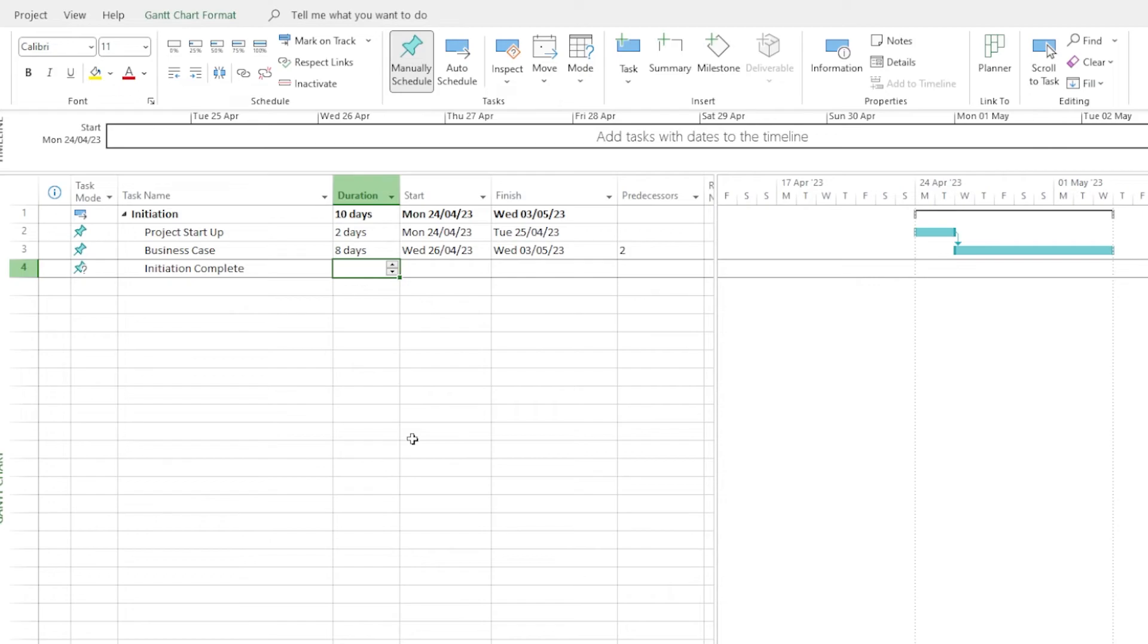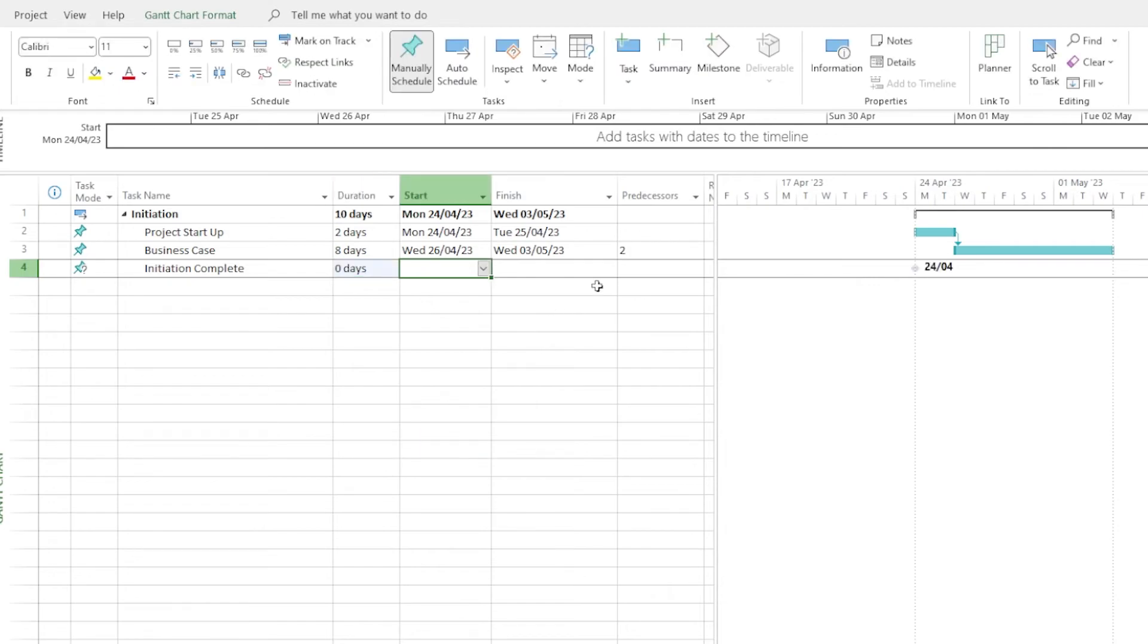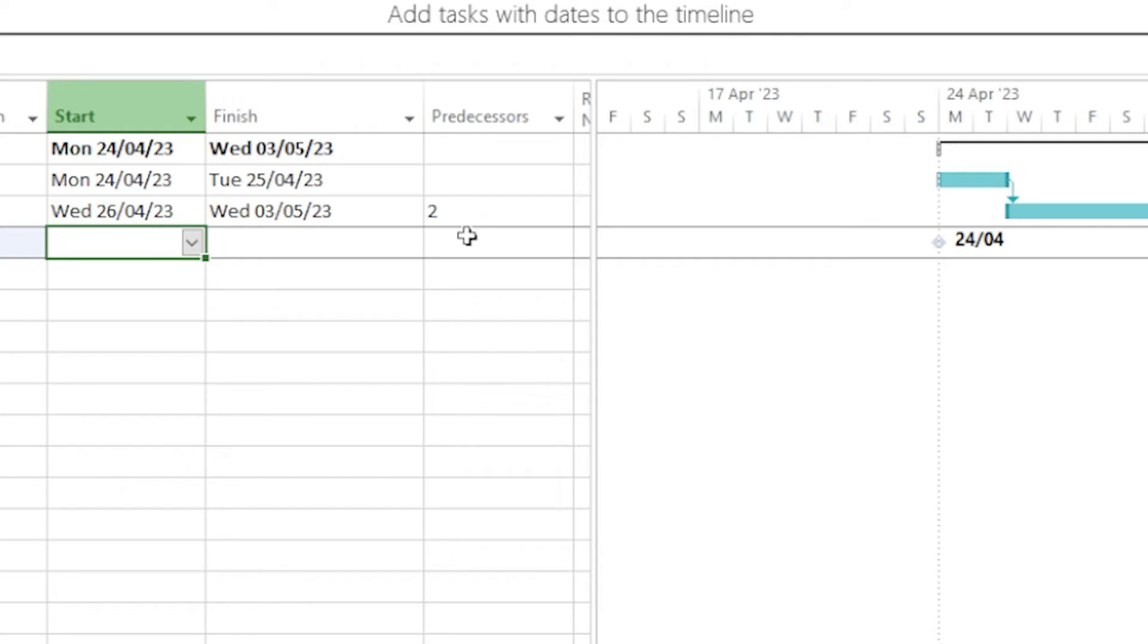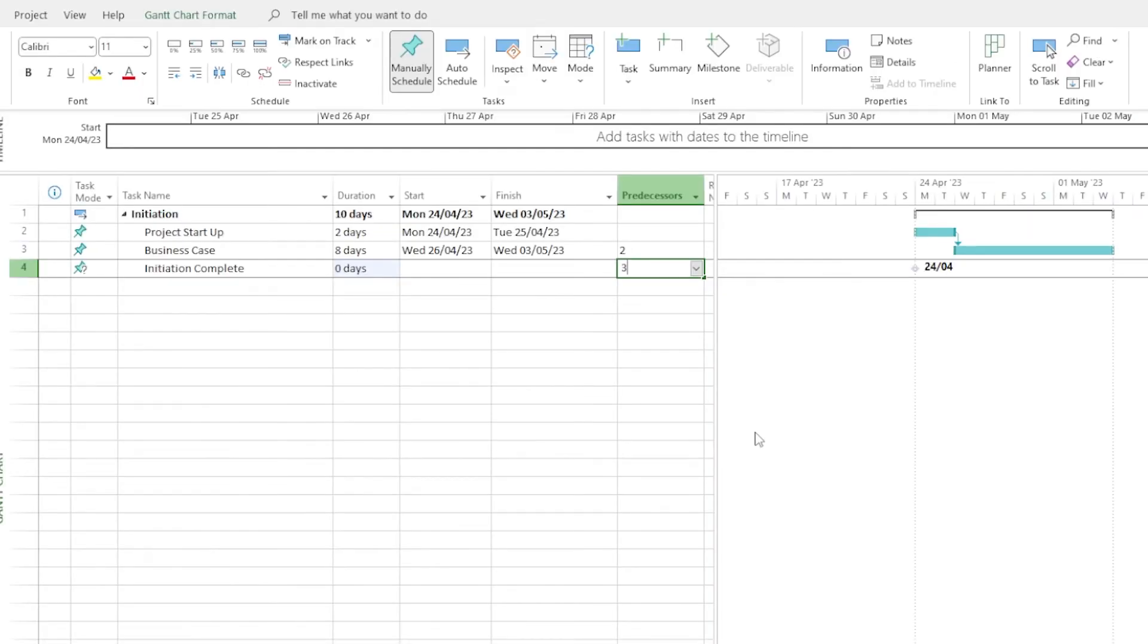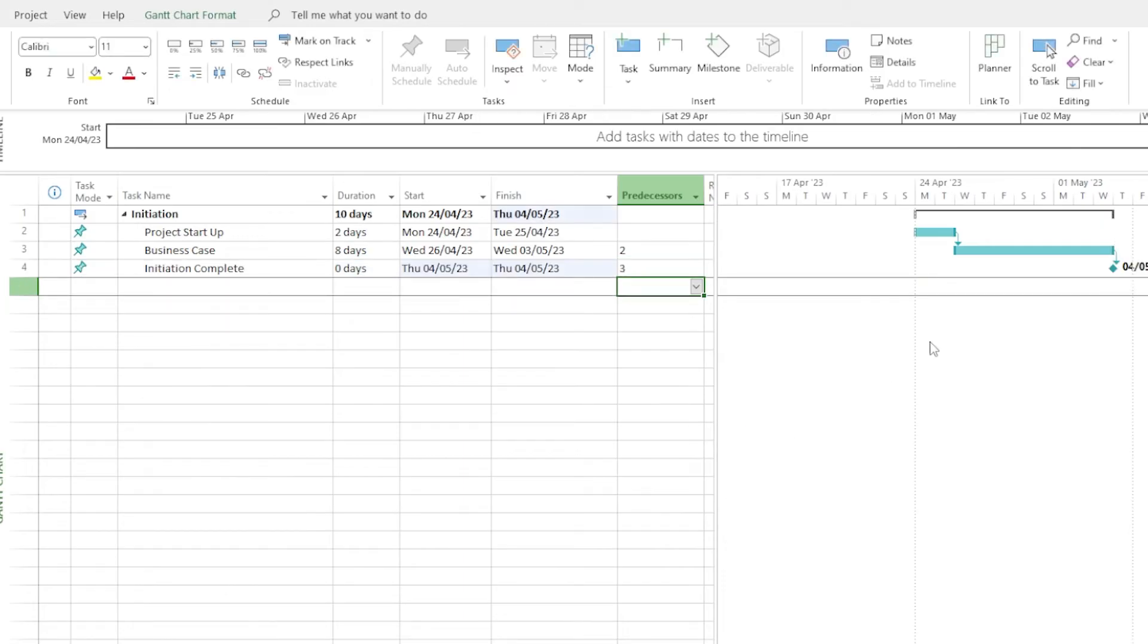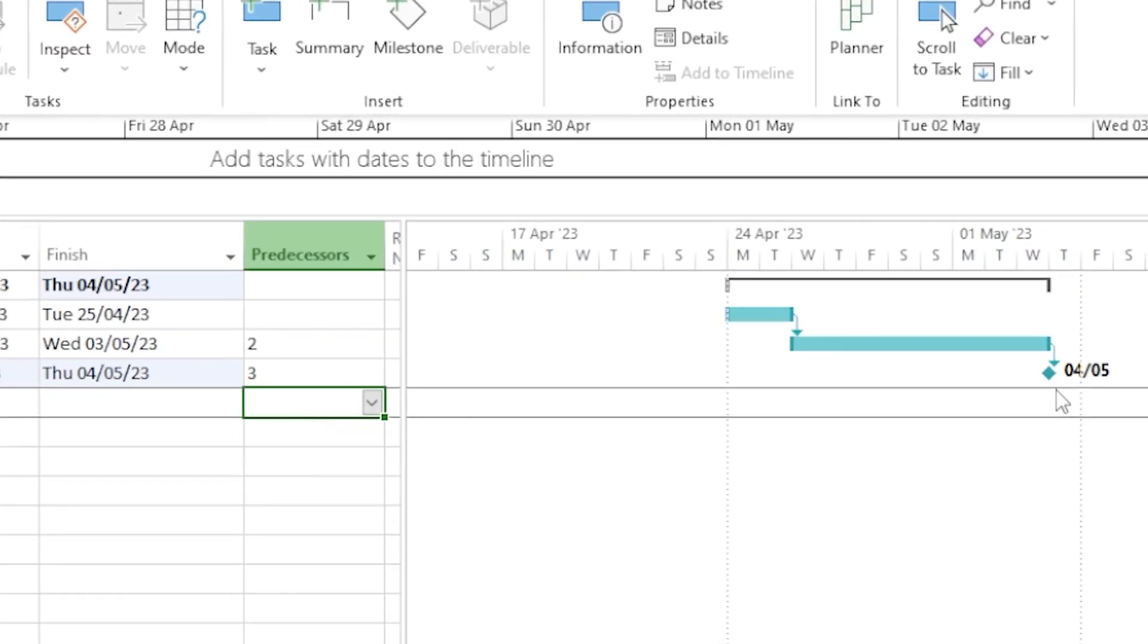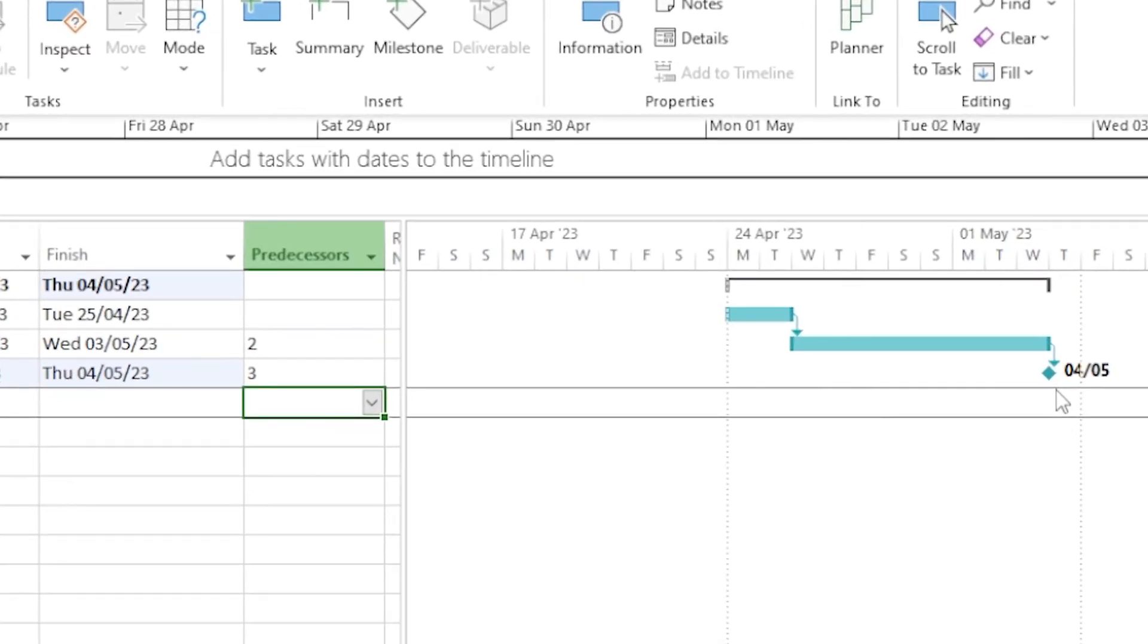To change a task to a milestone, go to duration and set it to zero days. Now you see over on the right, we have a little diamond that represents that milestone. I'm going to make that dependent on the business case being completed. And now it's moved across to the right and it's got an arrow connecting it.